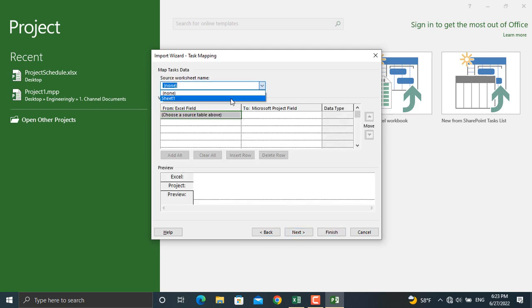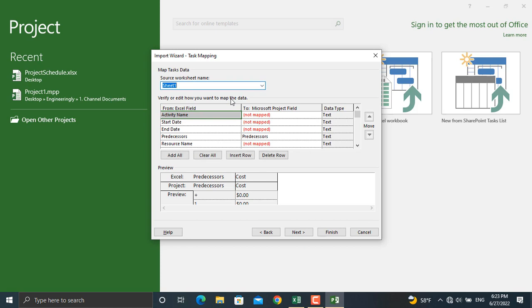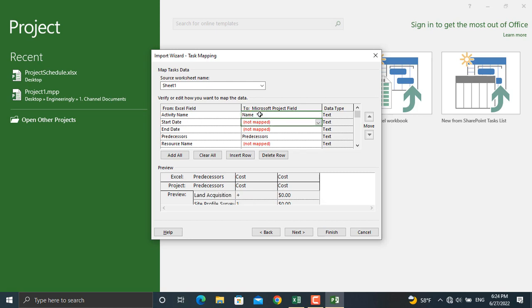So the file is selected in here. We will come and select sheet number one where our data is located. These are the columns which we named in our Microsoft Excel file. The activity name is called 'Name' in Microsoft Project, so I'll write down name in here. For the start date I'll write down 'Start.' For the end date I'll write down 'Finish,' since Microsoft Project uses this terminology.